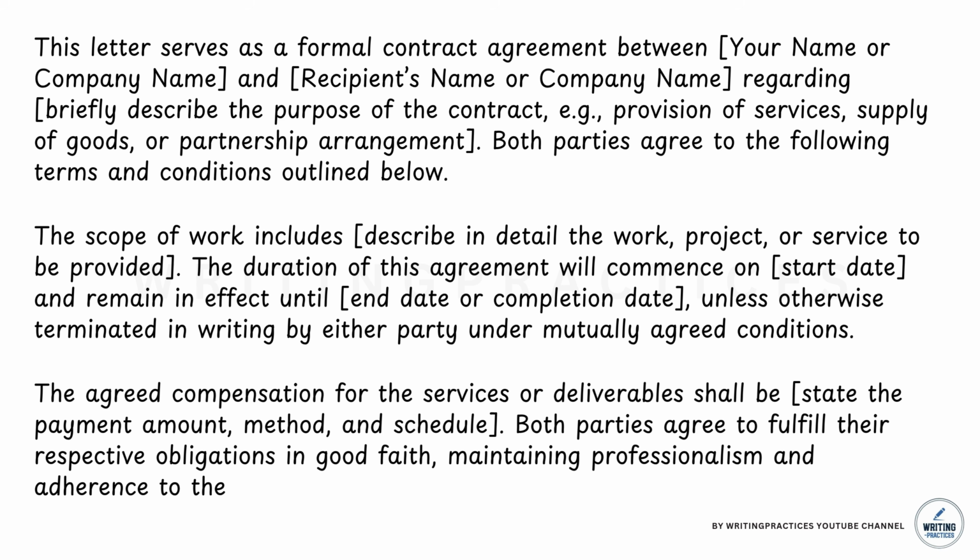You'll need to specify three main things here. The payment amount, how much will be paid for the service or goods. The method of payment, whether it's by bank transfer, check, or another method. The payment schedule, when and how often payments will be made. For example, you might write that payment will be made in full within 30 days of project completion, or in